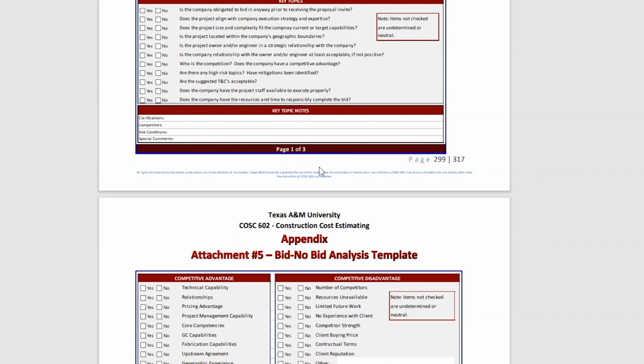And so the other two departments, when the estimating hands over the estimate, they convert it into the budget and they start tracking it and facilitating those efforts underneath construction management and project management.